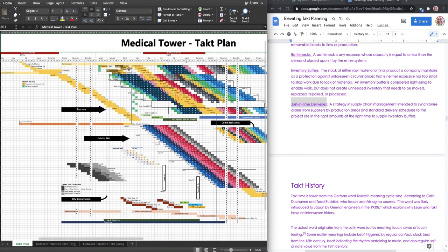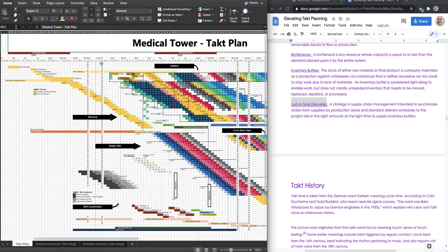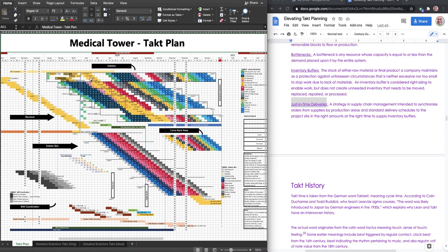The title. For Thanksgiving and Christmas, I just block those weeks out. We're not going to get them. And I show in this Takt plan the superstructure, the interiors, even though there are some efficiency gaps in there, Thanksgiving and Christmas again. Then we show the Takt phase labels here on the Takt plan.